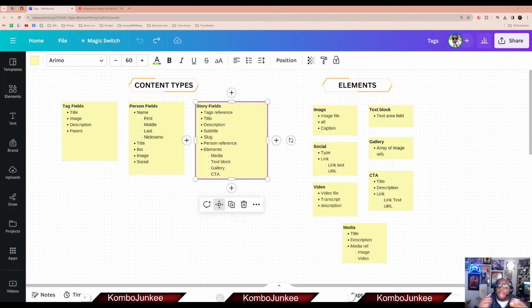So now in your product backlog, you'll have 3 tickets. One ticket would be solve the first layer of the cube. A second ticket would be solve the second 2 layers of the cube. And then a third ticket in the backlog would be solve the Rubik's Cube entirely. As part of the third ticket, there are prerequisite tickets: in order for me to complete ticket 3, you have to have completed tickets 1 and 2 first. So that's kind of how the ticketing system and the backlog system work.